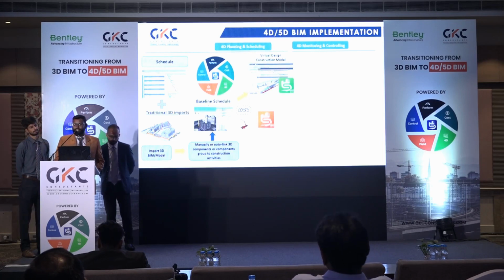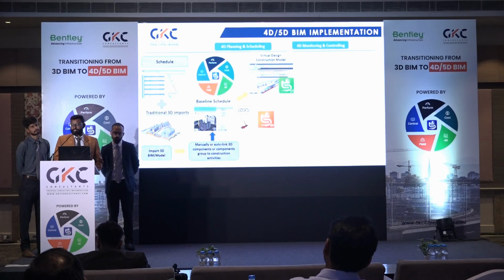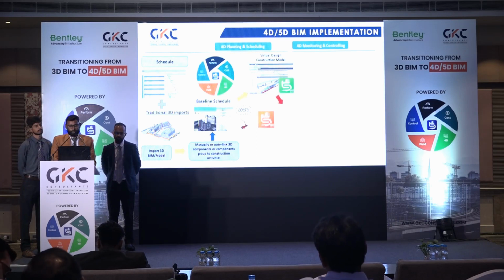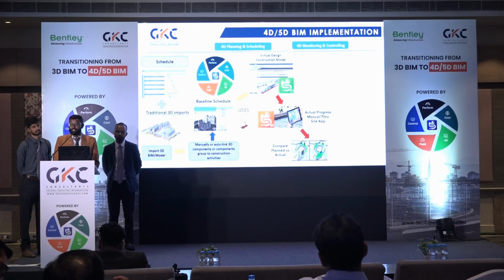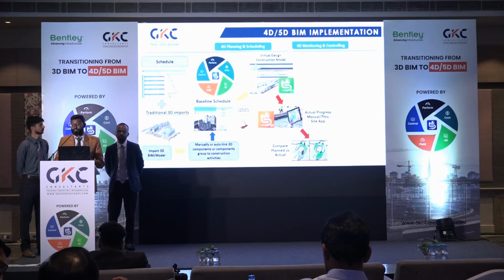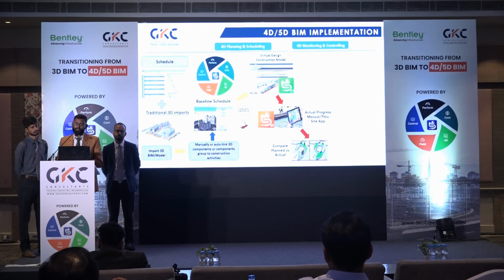We take all this data for the virtual construction. We can examine whether our schedule is constructible and whether the logical sequencing of the construction is feasible or not. From there, we can take the actual progress and monitoring from the site app. We can compare plan versus actual side by side in the 3D view only: one view shows the baseline and the other shows the actuals that we are getting from our site.